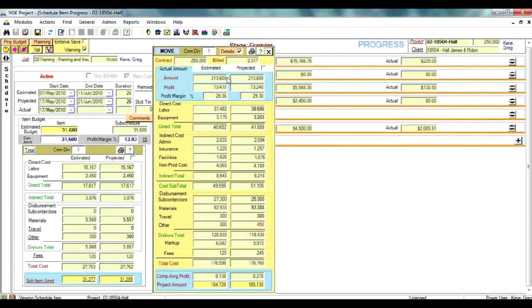With VGK budget, the user can set a detailed financial plan that includes project budget, budget for each job, and budget target for each task. The detailed financial strategy also includes planned amounts for each component: labor, subcontractor, materials, equipment, travel, and other expenses. A detailed financial plan allows the manager to control project expenses on a very precise scale and create conditions for financial discipline and successful project execution.